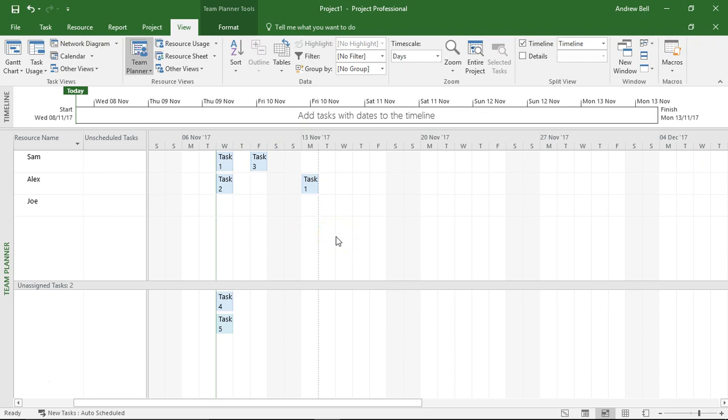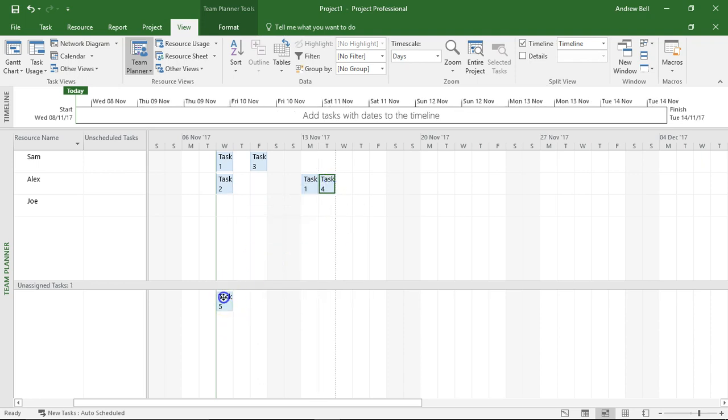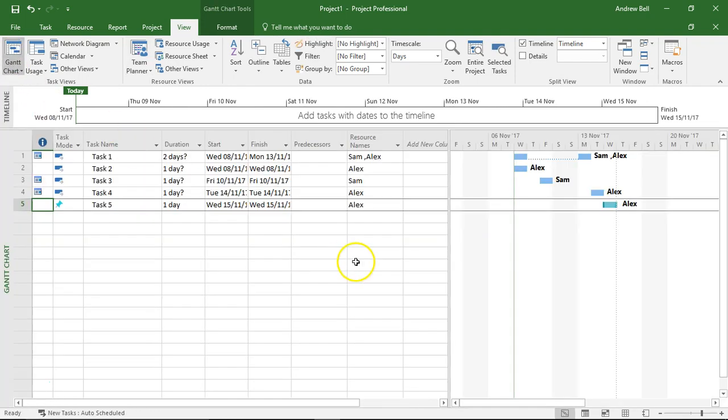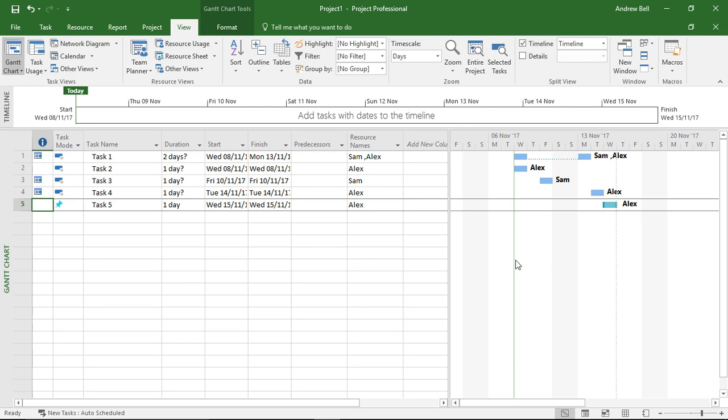Just be careful when you're dragging around tasks because it constrains things, gives the appearance of adding dependencies, but there are no dependencies. So if I put Alex in there, you know, I've constrained those tasks to happen on those dates and there are no dependencies. So there you are, that's my opinion. I don't like the Team Planner. Thanks for watching.